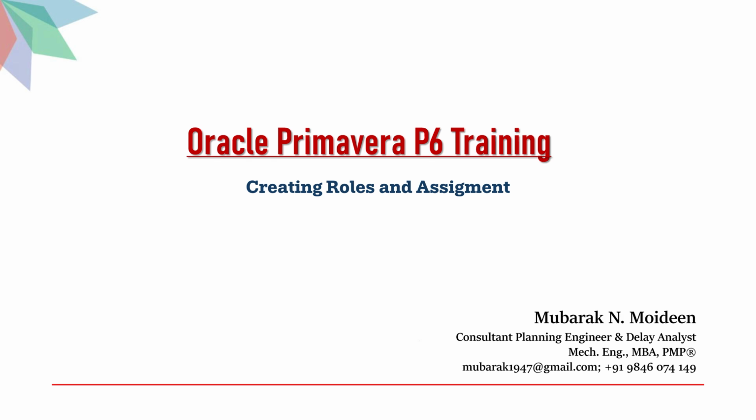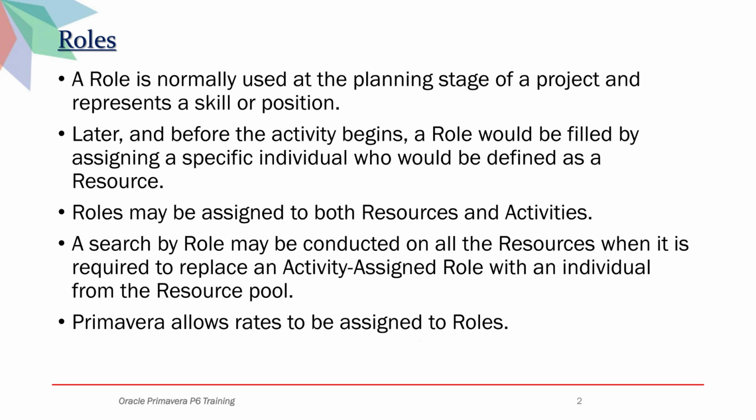From this session onward, we will be moving to a more advanced level. A role is normally used at the planning stage of a project and represents a skill or position. Later, and before the activity begins, a role would be filled by assigning a specific individual who would be defined as a resource. Roles may be assigned to both resources and activities.